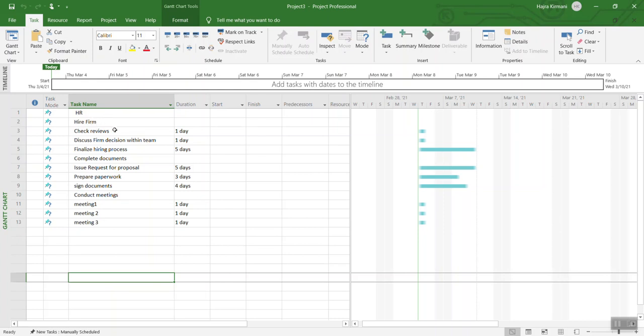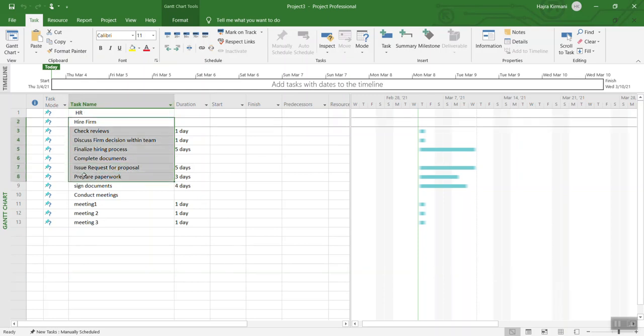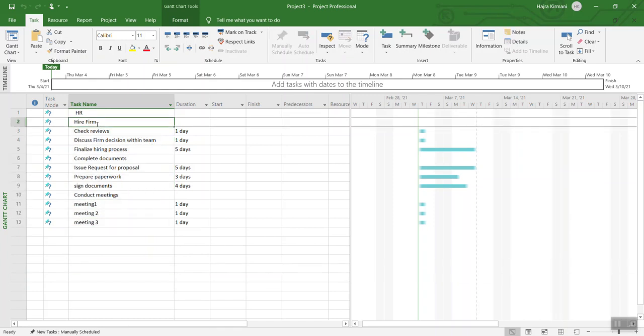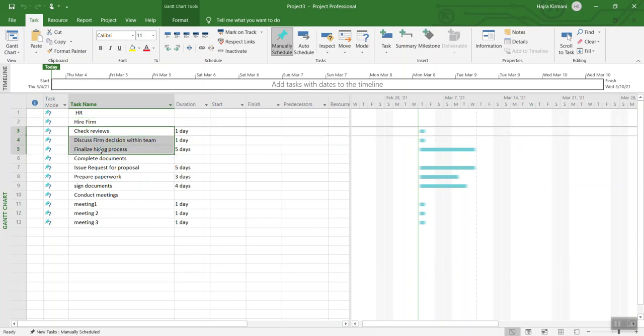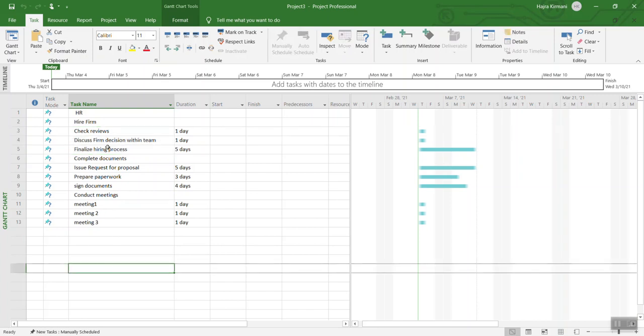We are going to identify what items they are and if they fall under any of those other items. For example, we have HR and it looks like all the items are related to HR anyway. But when you look at hire firm, there are three items over here which should fall under hiring a firm.